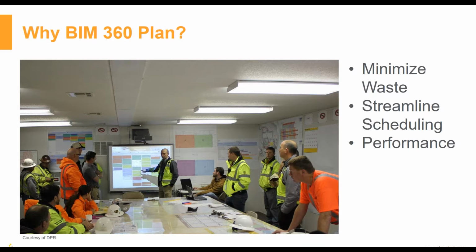So somebody has to sit there and actually take that information that's on the wall, write it down. So now you're introducing the opportunity for mistakes because you're essentially doing data entry off of a sticky note on the wall. And God forbid a breeze runs through the room and knocks them off. So now you have that. Now, every time that there's a change, somebody has to note that that was changed, then update the Excel file or Microsoft Planner or Primavera, and then push that out to everybody. So you're adding a lot of time to this.